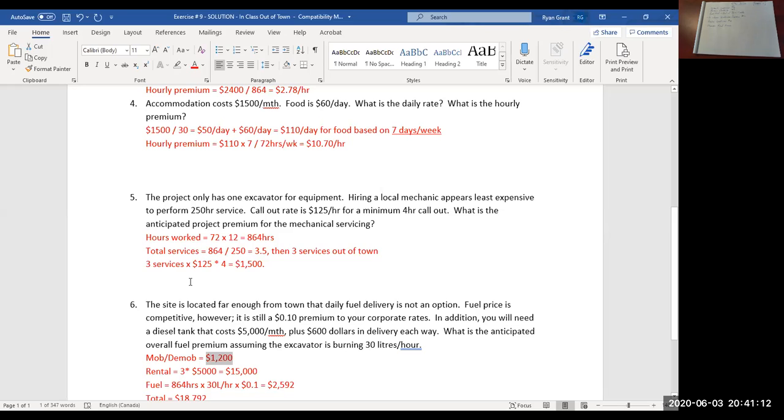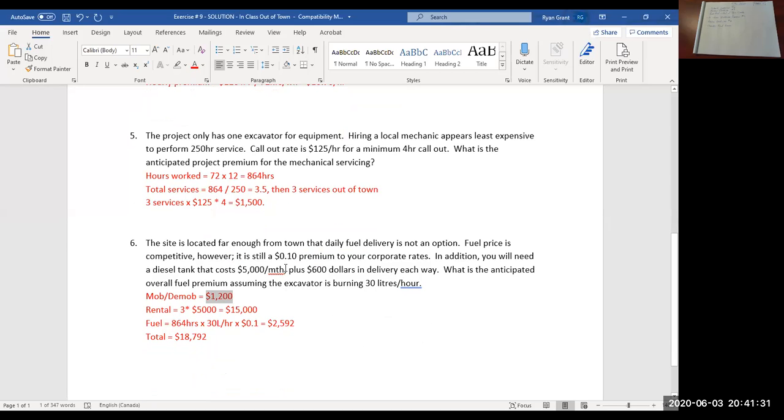So if the truck is able to find something else to pick up there and drive back, you would only have to pay him to go up there. He would charge the other company the cost for him to come back down to where you are. So that's the ideal scenario where he's able to haul both ways. So he's not coming back empty.